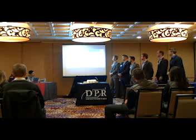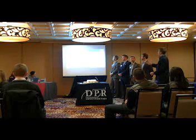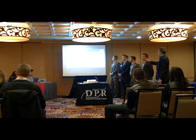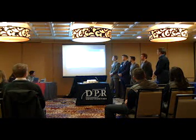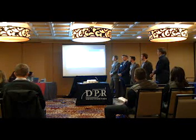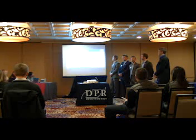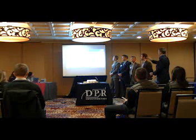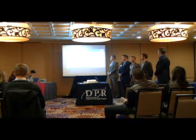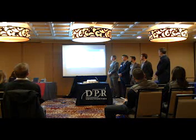Going into the logistics of phases 1 through 3 and the risks associated with each, firstly, we will have the temporary utilities connecting the existing facilities to our temporary office and the facilities on site. And secondly, we'll have the public easement on the western side of the site, where we will be installing a grade beam and a sidewalk, as well as a site fence and a silt fence. Third, we'll have silt runoff as our third risk, and we'll mitigate this risk by coming up with an effective logistics plan and installing silt fencing.